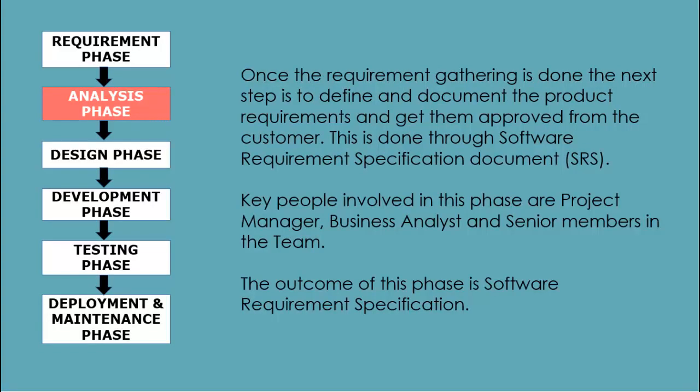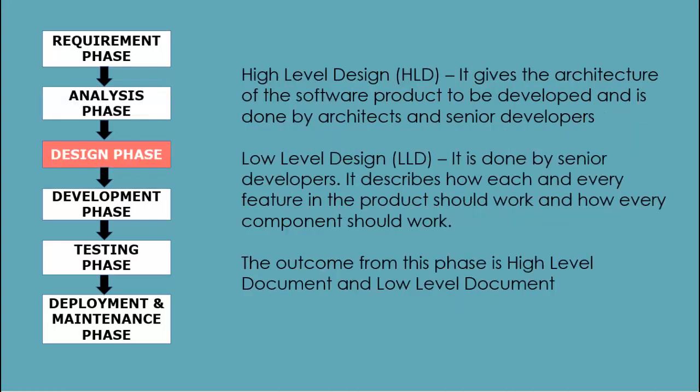Analysis phase: once requirement gathering and analysis is done, the next step is to define and document the product requirements and get them approved from the customer. This is done through the Software Requirement Specification (SRS) document, which consists of all the product requirements to be designed and developed during the project lifecycle. Key people involved in this phase are the project manager, business analyst, and senior members of the team. The outcome of this phase is the Software Requirement Specification.